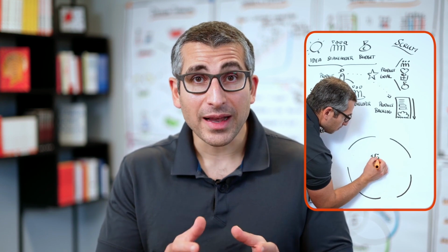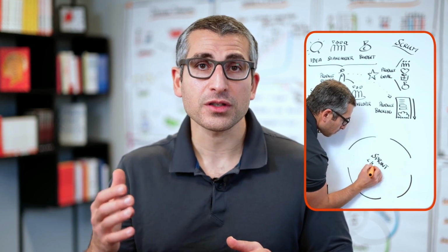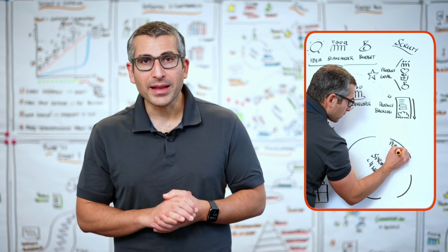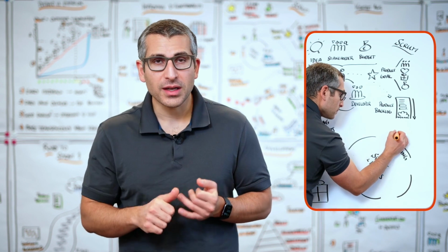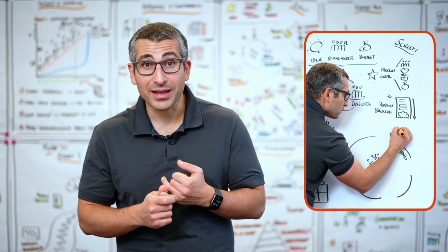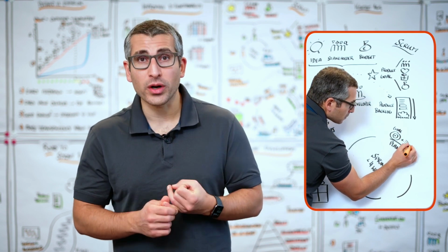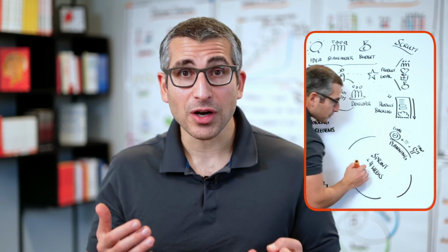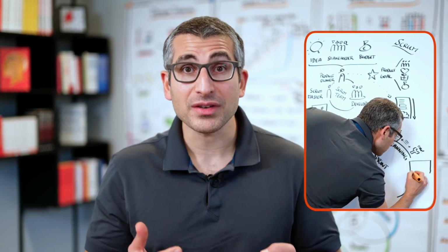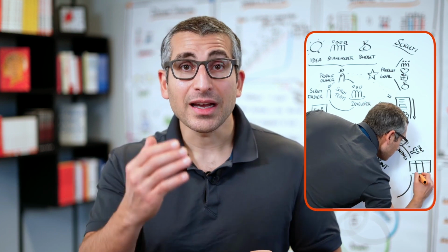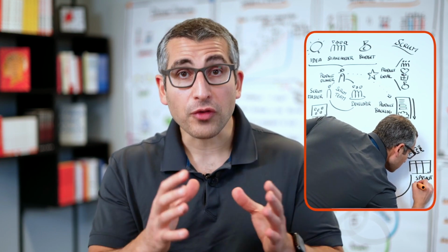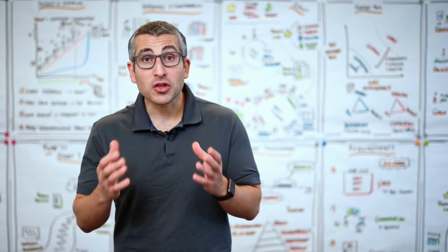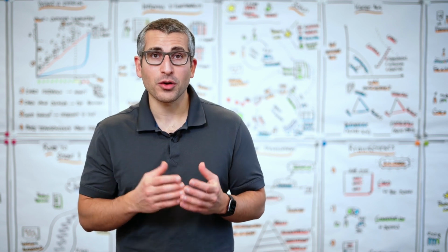With all of these things in place, we can go into our very first sprint. Every sprint starts out with a sprint planning event. Sprint planning consists of 3 elements. First, what is our sprint goal? Ideally, the product backlog is prioritized accordingly. What kind of outcome do we want to achieve? Based on the priorities that we have in our product backlog and the capacity we have as developers, the developers select a certain amount of items and move them from the product backlog into the sprint backlog. Last but not least, the developers talk about how they are going to implement those items.